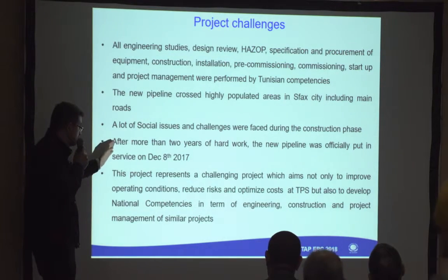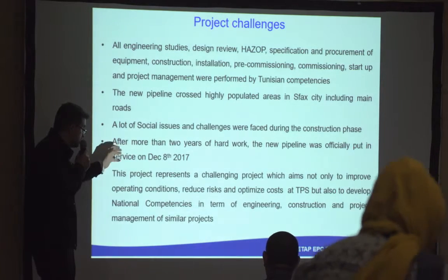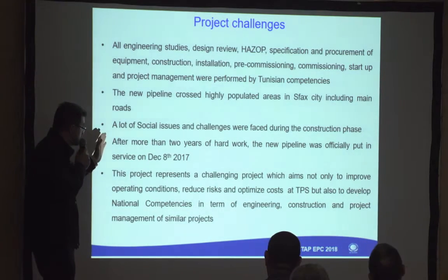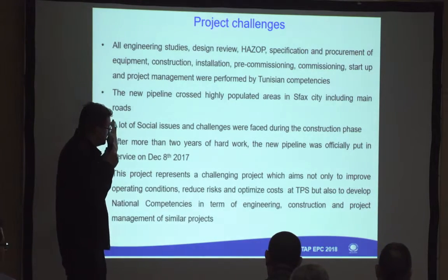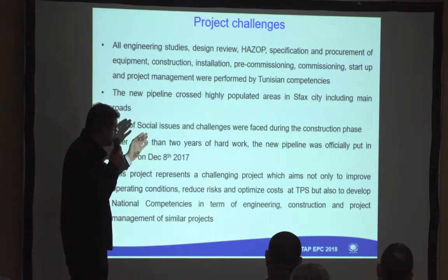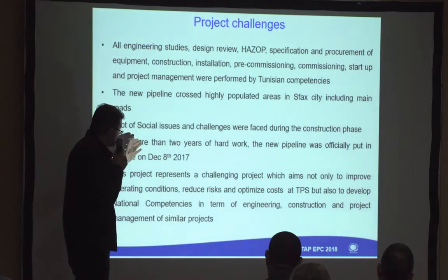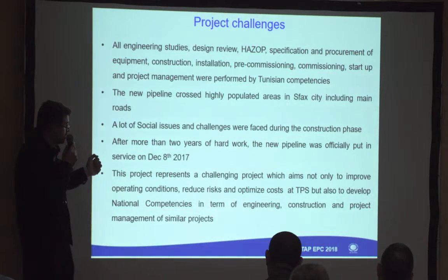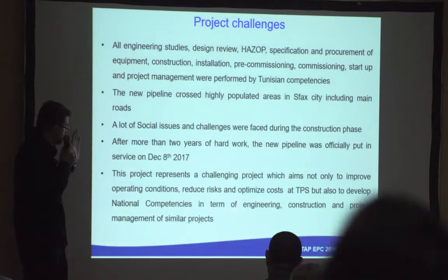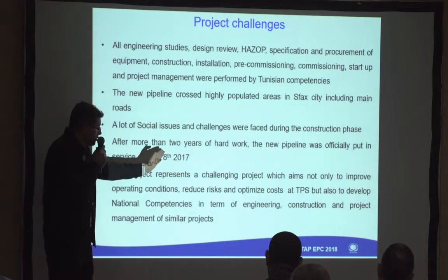It is clear we had some delay to deliver this project, but these 2 years were hard work. The delay was mainly due to CSR issues, but after these 2 years of hard work, we delivered the project and started it on December 8, 2017.